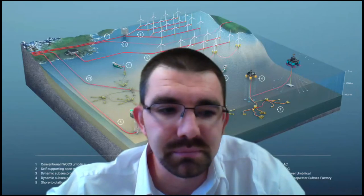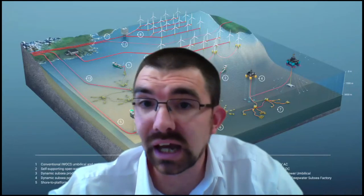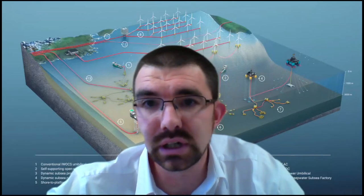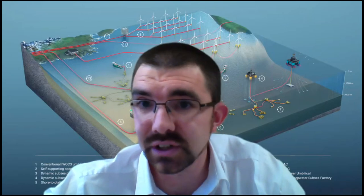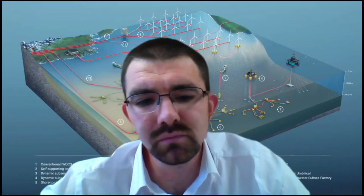You could be 30, 40 nautical miles offshore, which means that you are effectively on your own. Communication can be very poor, so you need to set up those systems. So just to get small things offshore is incredibly difficult. For example, a nautical bolt could set your project back days, which could be costing hundreds of thousands of pounds. So it's really extremely challenging, with different layers.